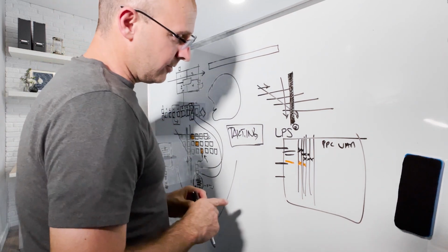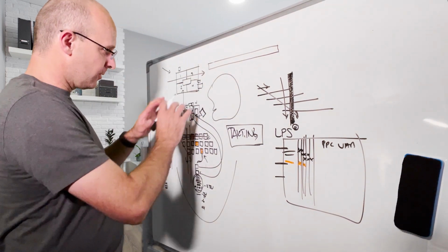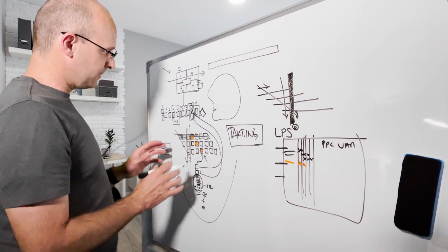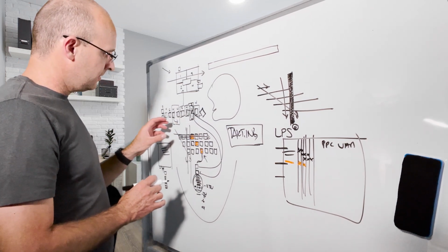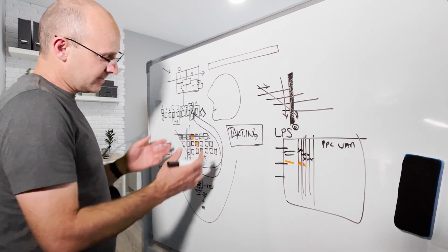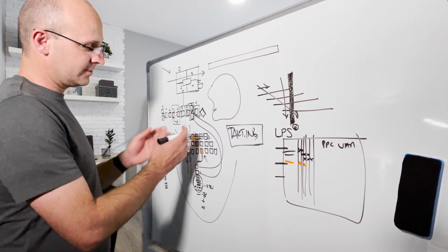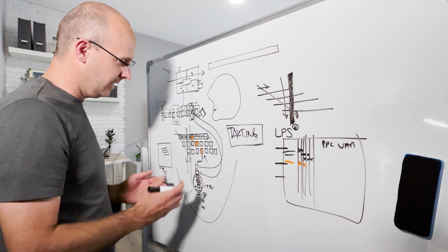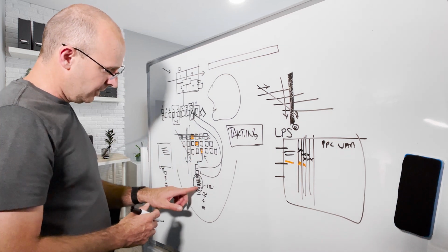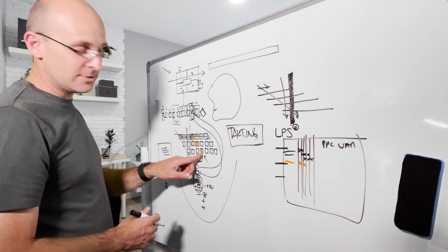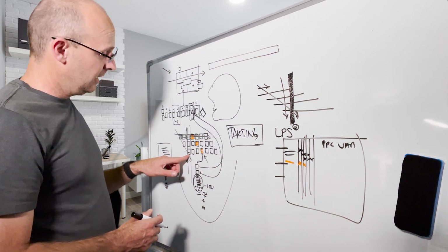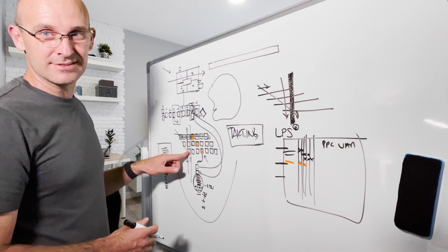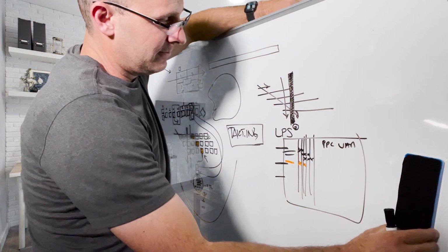Now, you can literally run the whole job from the Takt plan, because the pull plans become Takt sequences, and this whole plan is in and of itself a 90-day look ahead, a 6-week look ahead, a 3-week look ahead, all of it. And for the work steps, if there's a preparation one, you can queue it up earlier in the work steps of these other work packages inside these other Takt wagons. So it's absolutely beautiful. Now, let me erase this.